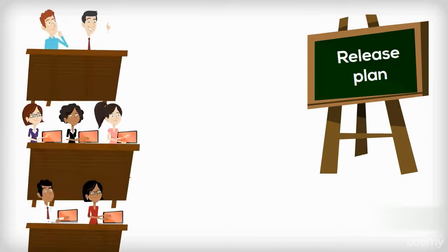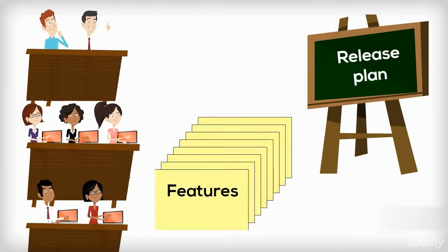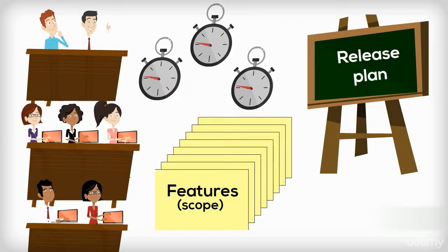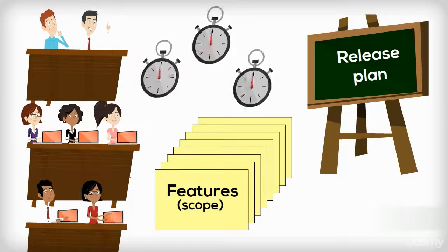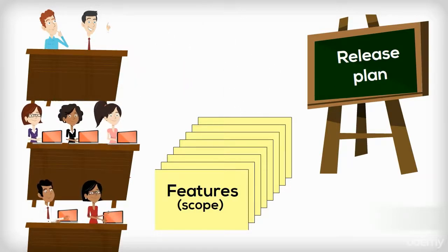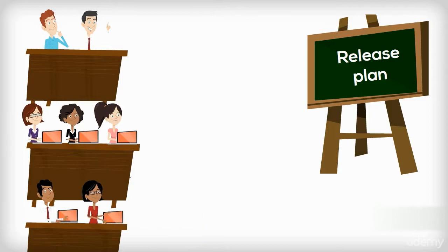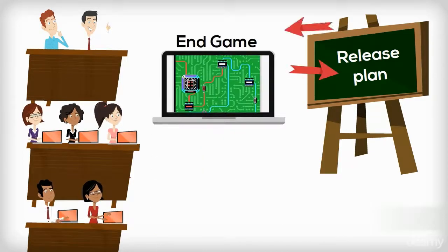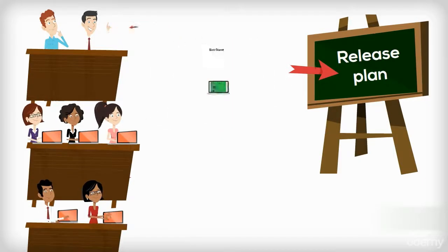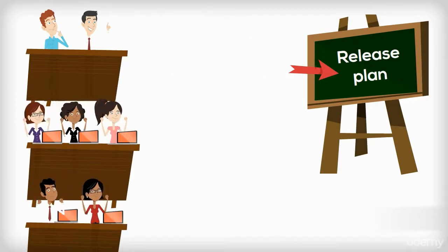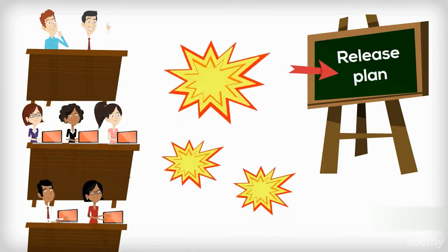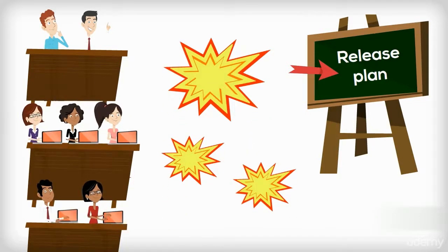Chapter 8. Release Planning. The purpose of the release plan is to give the Scrum team a reasonable forecast of the number of features, scope, that are likely to be delivered within a specific time frame. The time frame may be of less importance if the release is scope-driven, as explained below. The release plan focuses the whole Scrum team on the end game and vision of the product owner. This usually spurs on a highly motivated development team and brings any issues to the surface as early as possible.